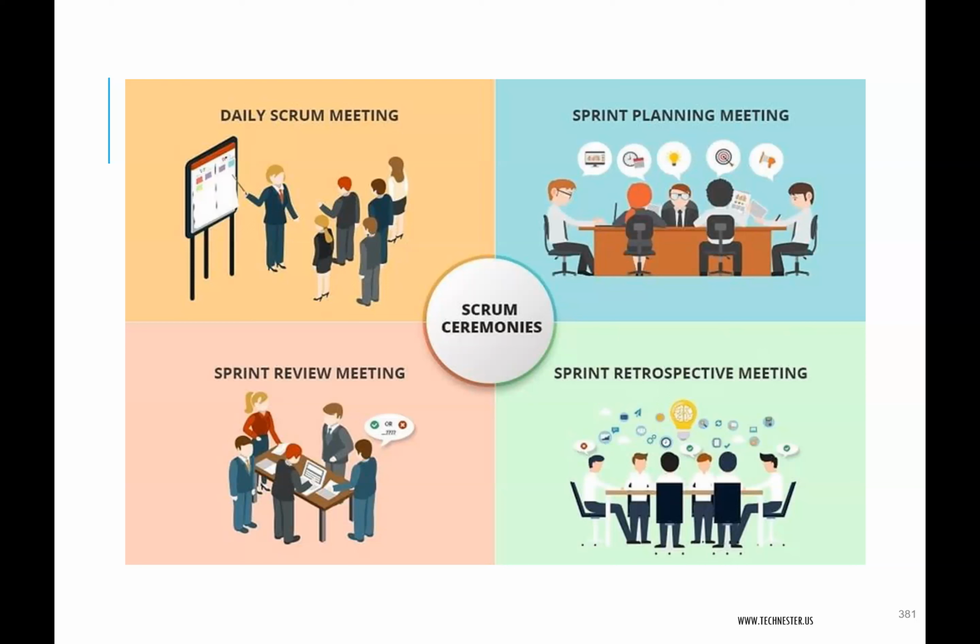So we look at the product backlog. From that product backlog, we are going to plan the sprint backlog. And we're going to plan the manpower. That is when we look at what we're going to achieve within that 2 weeks of sprint. It depends on the company or it depends on the team. So it's usually like a 2 to 4 hours meeting. And we do estimation during that period, estimation of manpower, estimation of story point.